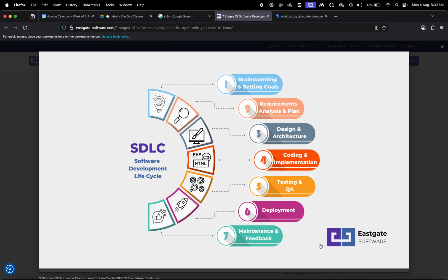Imagine in this waterfall approach, what I told you: for the first 6 months you're writing the code. It means the QA and testing guys are sitting idle. The operations guys who need to deploy and build are sitting idle. See, there is a waiting time here. Once the 6 months of development is done, testing goes on for 2 months.